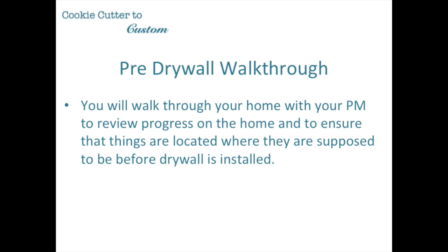Another part of the process is typically a pre-drywall walkthrough. This is where you will walk through your home with your project manager to review progress on the home and to ensure that things are where they were supposed to be before drywall is installed. So this is where you're checking your plumbing, your electricity, things like that.